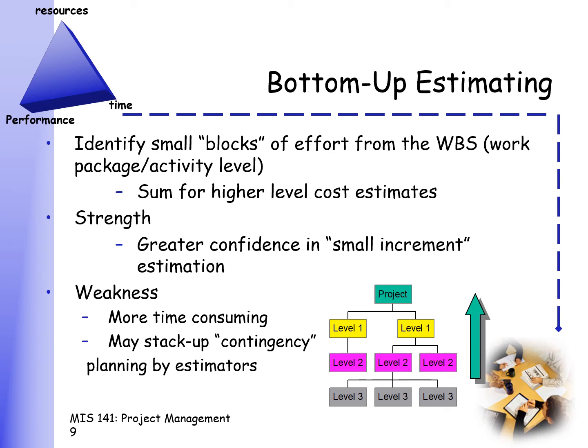You're now going to end up with a project that is bloated in terms of duration, in terms of the estimates. Imagine if each and every individual just adds 3 days, or maybe worst case, 1 day, and you have 100 activities. Now, just adding 1 day to each and every one of those activities will yield you more or less around 5 working months, an additional 5 working months.